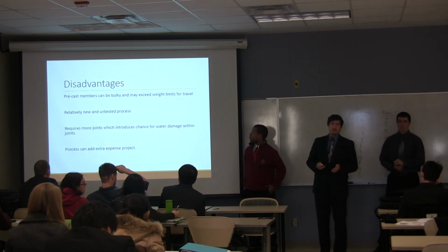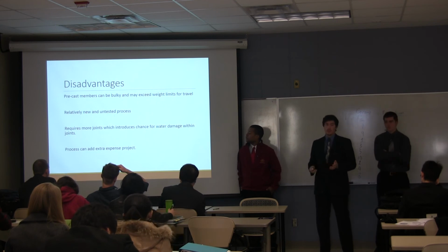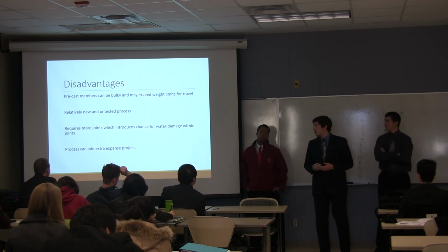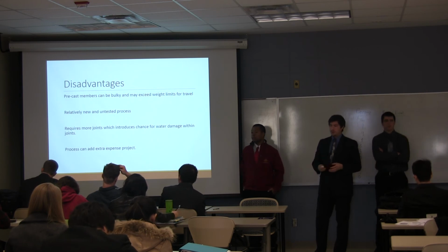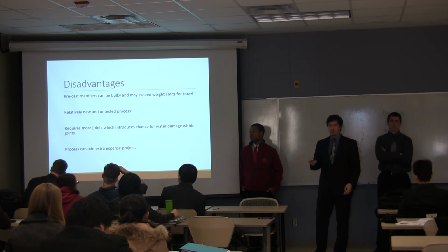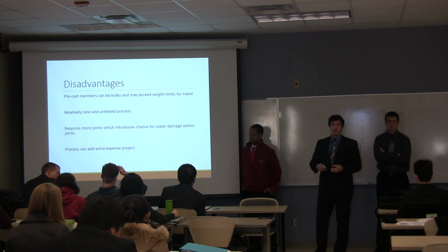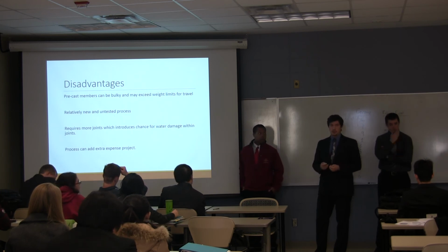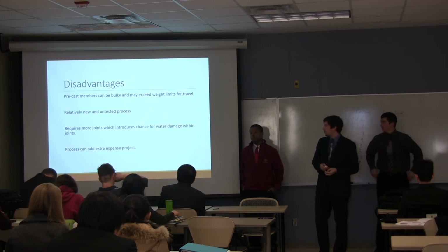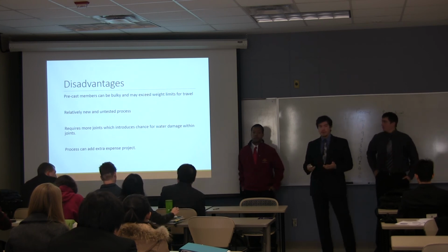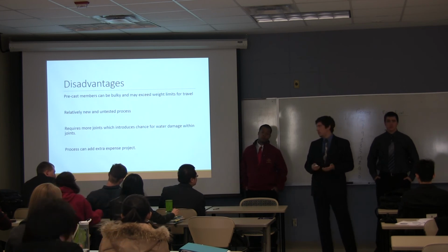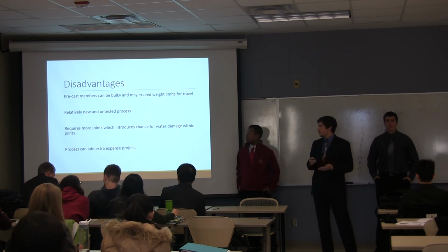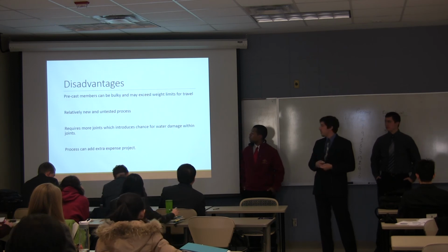Some disadvantages are precast members can be very bulky, and they can also be hard to get to the job site. If you have a whole bridge span traveling down the road, that's going to cause traffic, that's going to place a lot of load on the roads, and that can cause more problems. It's a relatively new process, so it's still being proven whether it's effective or not. So still working out the kinks.